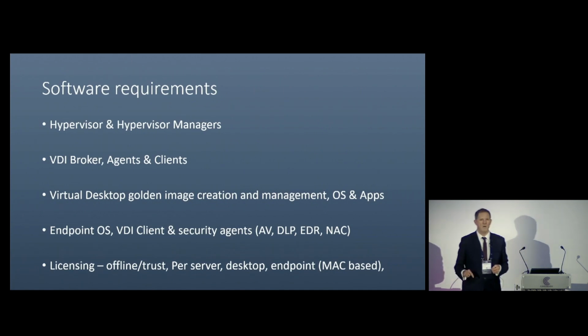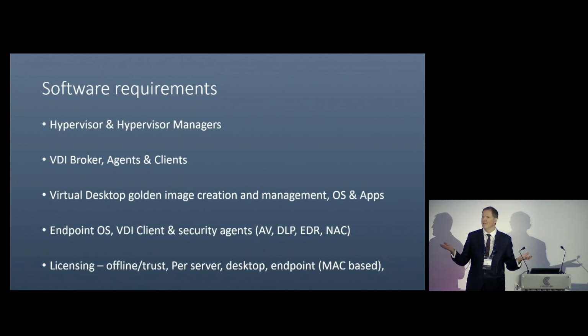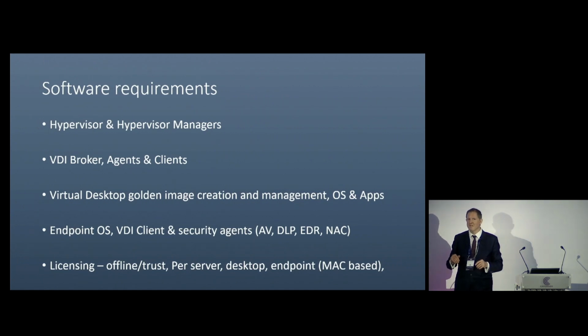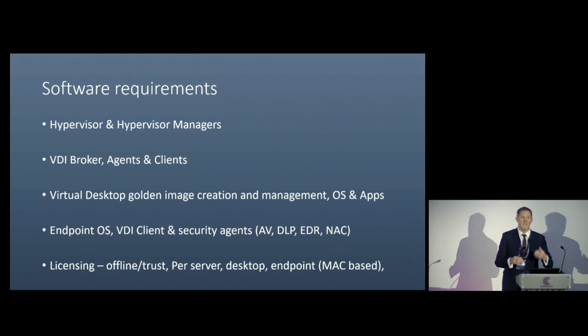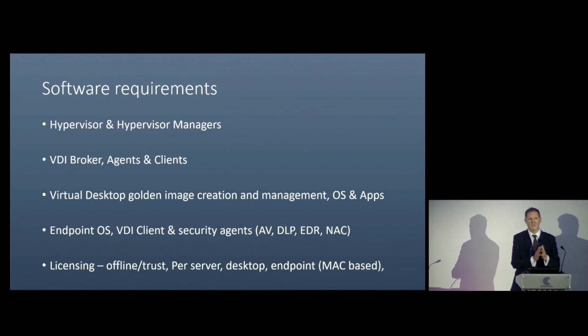Okay, why is that going to be a challenge? Why is it going to be a challenge that if a software is based on MAC address licensing? Anyone? Yeah, can't authenticate it. Is the customer going to give me their MAC address so I can generate a license? Yeah. So sometimes we have to ask nicely and negotiate with the customer, can you send me some MAC addresses for the servers or for the thin clients that I want to deploy a license to?